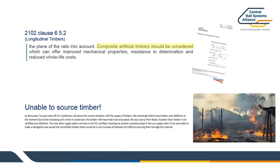However, one of the problems we came across, which was a real showstopper, was that the source of greenheart timber was constrained in two ways. One, we wanted a length of timber a lot longer than was available, as they could only provide up to 6 meters. And with the supplier being based in Cameroon, there's a lot of civil unrest in the country at the time, and I think still going on. So trying to get anything out of the country that would meet the lead times we needed for renewal was nigh impossible. The lead time was going to be probably 1 to 2 years. So we needed an alternative, one that could be sustainable, but also meet the requirements of the length of timber bearer we needed compared to what was available.